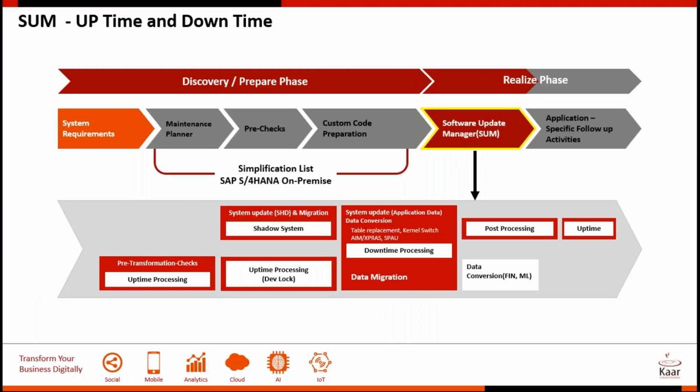It does all these checks, installs some components, creates these structures, and creates a shadow instance. And then at one point it says you're ready for your downtime. You'd want to get to this phase maybe 3 days or 5 days ahead of time, so in case there are some issues, you have time to resolve them.